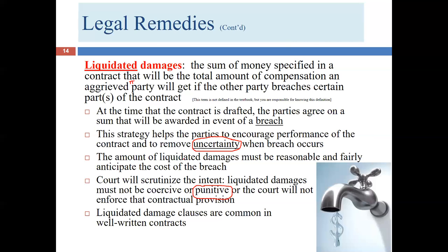It's not designed to reflect the actual damages Bob experienced. Well, Bob's response is going to be, wait a second, I didn't have a crystal ball. I didn't know what price Connie was going to be able to offer me widgets. And I didn't know that she was going to luck into having the inventory right there to send it to me so I didn't have to close my factory. I lucked out this time, but next time, I might have needed to pay $5,000 and I still would have just gotten $2,500. And so the review of whether it's reasonable or not isn't what actually happened, but what were some reasonable scenarios? And is the liquidated damages clause consistent with those? If it is, then the court's going to enforce it. If it is significantly off the mark, significantly higher than what the actual damages likely would be, then the court is not likely to enforce those damages.